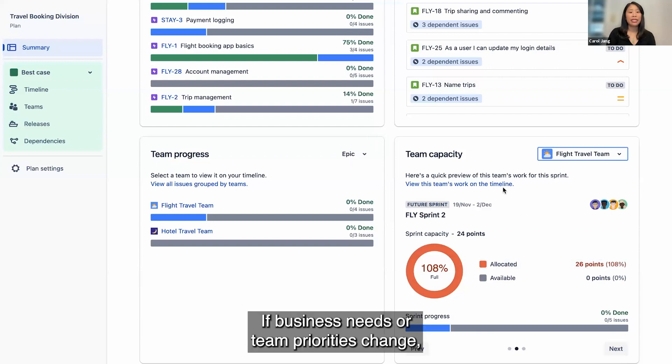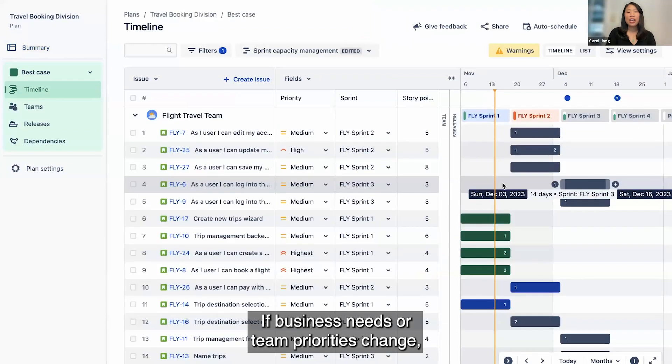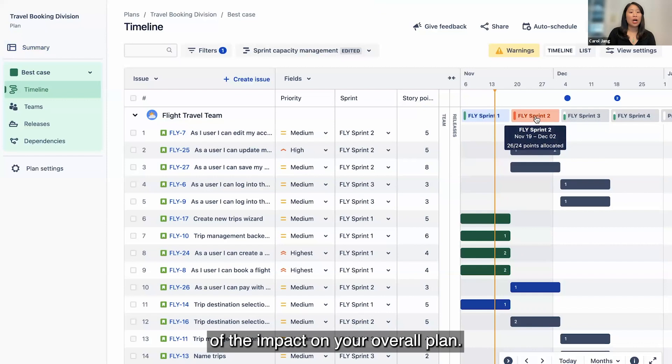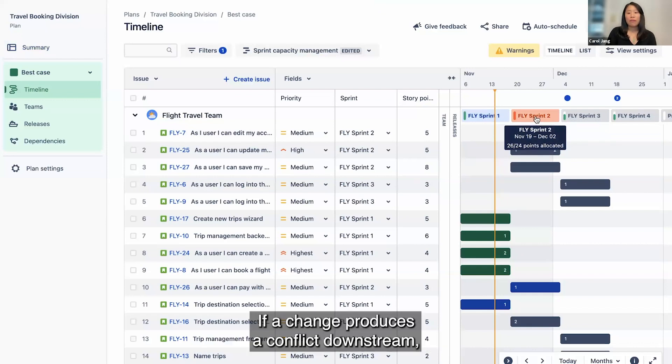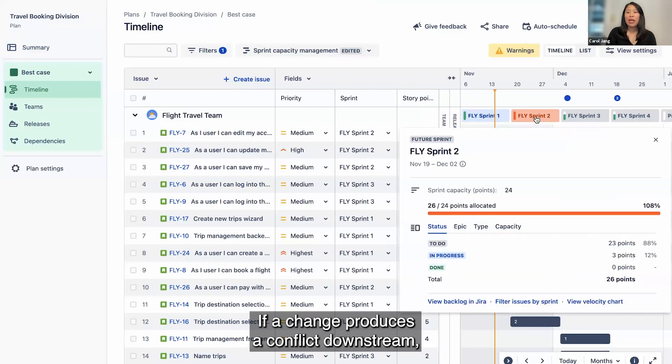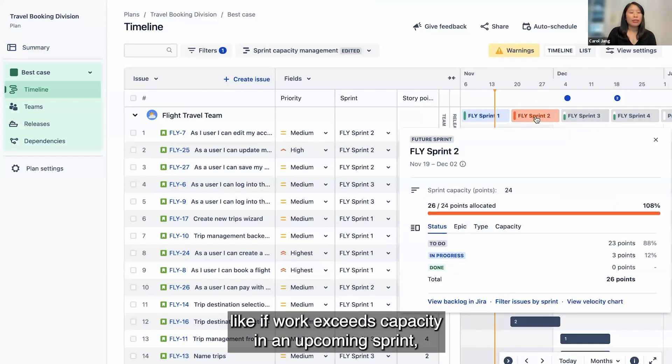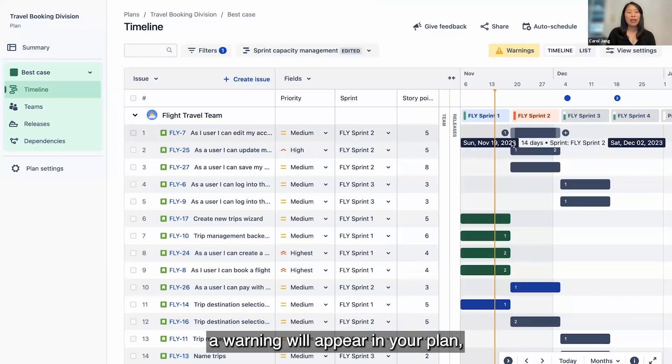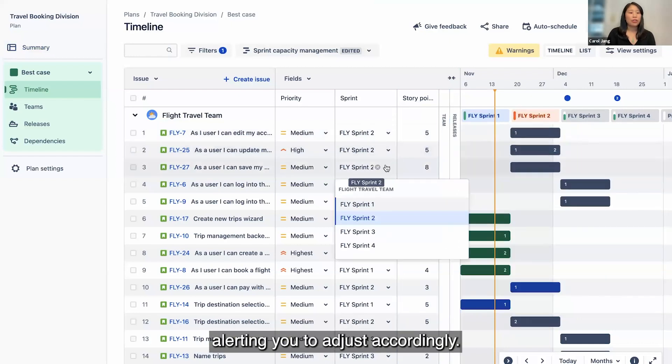If business needs or team priorities change, you can make updates with full visibility of the impact on your overall plan. If a change produces a conflict downstream, like if work exceeds capacity in an upcoming sprint, a warning will appear in your plan, alerting you to adjust accordingly.